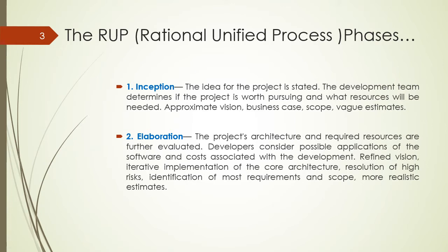The first phase is inception. The idea for the project is stated in this phase. The development team determines if the project is worth pursuing and what resources will be needed. We approximate the vision, the business case, the scope, and give approximate estimates for the project.